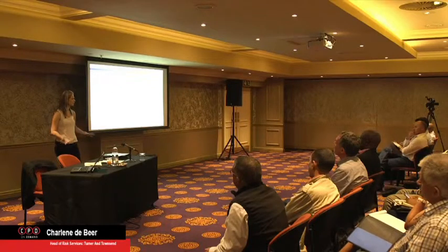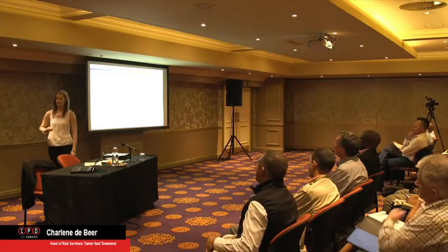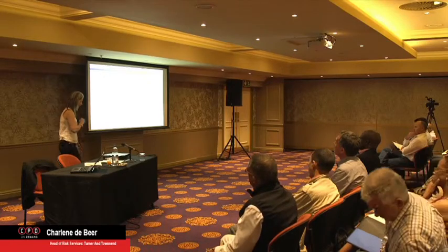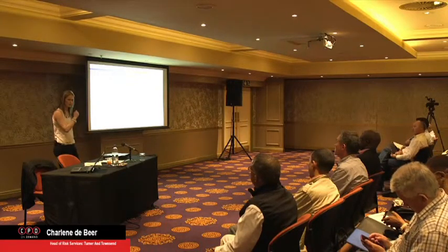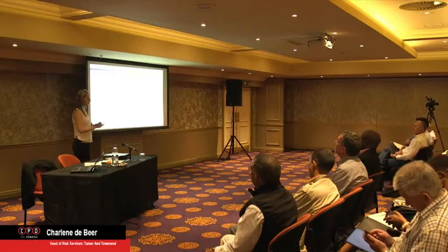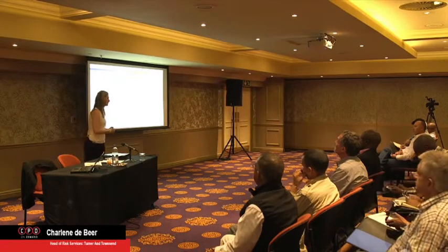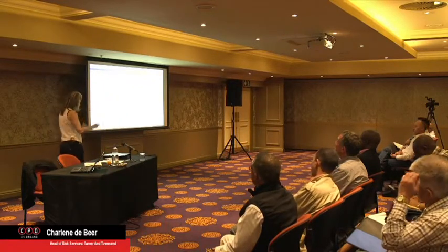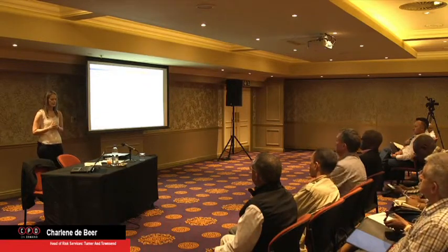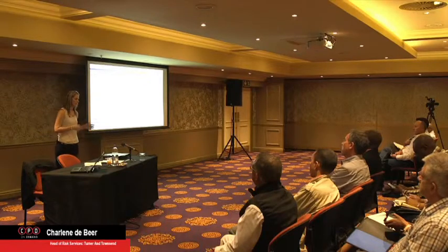We've got a risk register. Let's just update it, see what activities in the schedule we're going to link to it, and tell me when we're going to finish. I said 100%. I sat with the planners, the cost engineers, and all the team members. We did a proper evaluation, and then I did a risk-loaded schedule. Then I said to him, well, which date would you want? And he said, give me a P50, because the guys love 50%, right? He said, give me the date if it's a 50% chance that we will overrun. And I said to him, you'll finish in September 2015.